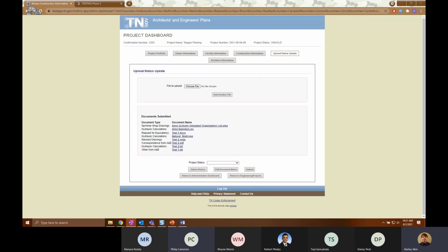And maybe what we'll do, once we go through these different things, is I'm listing out all the ones that we're discussing. Then we can go through and prioritize them, and if there is time, we can try to fit those in. If not, then we have a checklist for any enhancements after the project closes, to see which ones to tackle first. Sound like a good plan? That sounds like a good plan, because a lot of the other things that I have that I don't think we've sent y'all seem to be more bugs than actual changes.